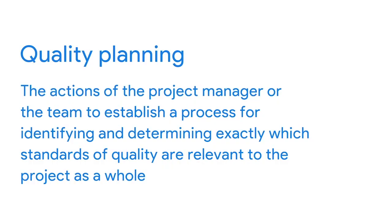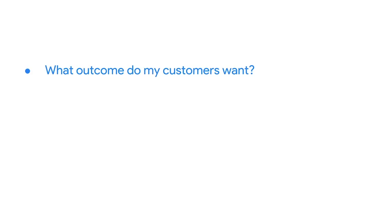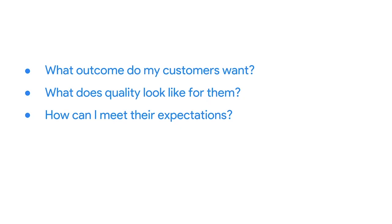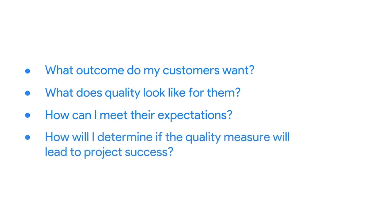Next up, quality planning. Quality planning refers specifically to the actions of a project manager or the team to establish and conduct a process for identifying and determining exactly which standards of quality are relevant to the project as a whole and how to satisfy them. To steer that discussion, you can ask yourself: what outcome do my customers want at the end of this project? What does quality look like for them? How can I meet their expectations? And how will I determine if the quality measures will lead to project success? This is where you'll plan the procedures to achieve the quality standards.